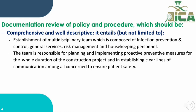The policy should address establishment of a multidisciplinary team composed mainly of infection prevention and control members, general services, risk management, housekeeping, biomedical, and maintenance members. These teams are responsible for planning and implementing proactive preventive measures for the whole duration of construction and renovation projects, and for establishing clear lines of communication to ensure patient safety and avoid contamination or risk to patients.